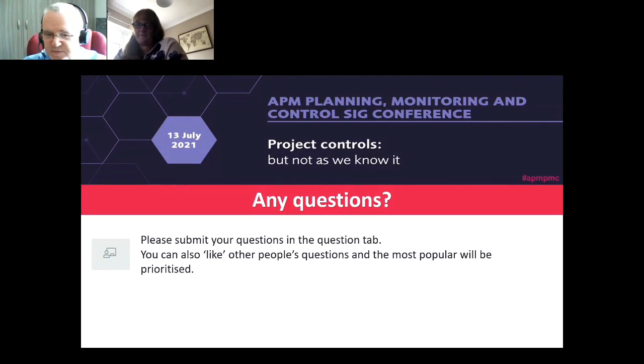In terms of the people stuff, the resourcing bit was quite good as well. We didn't put the level of detail in, but what you could do is put people's skills in there, in terms of what they were good at or what their job or role was, and you could get Planview to pick who was the best person to manage this project automatically. We didn't actually use that. We thought it was a step too far in terms of automation, and the head of projects, even though he had quite a number of project managers and task managers, knew all of them individually, and he didn't feel he needed that level of detail.